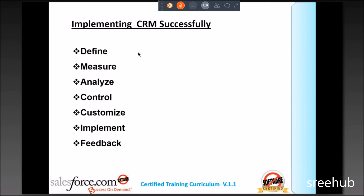The Implement or Go Live stage is where you start migrating the data. Any current data that is available, you start loading it. You implement from sandbox to the production server — you deploy all the thoroughly tested work into the production environment. Then you say: effective tomorrow night at 12 a.m., Apollo Hospital goes live on Salesforce. Next day morning, every patient's details are entered in salesforce.com — your software is live.